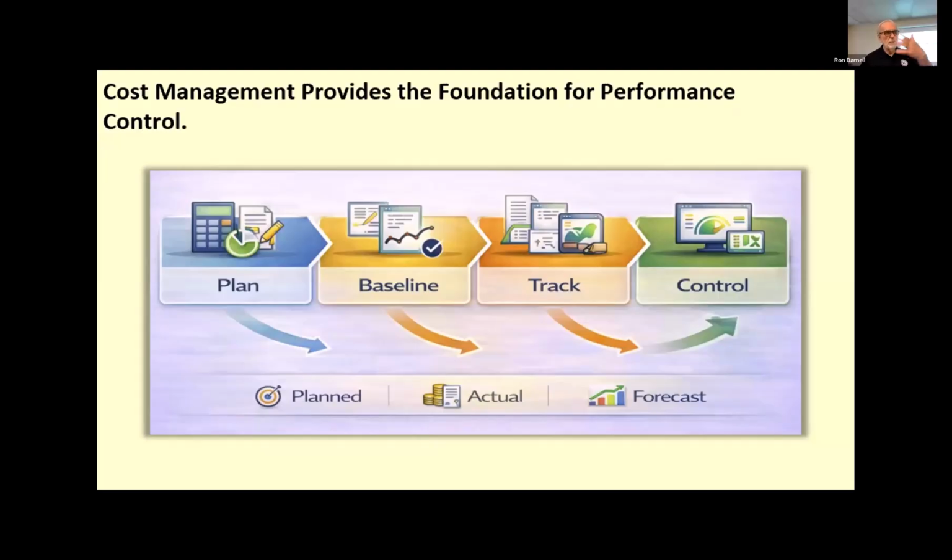In planning, we should have set all of the framework up for how we're going to accrue costs and time, all the rules of how we're going to manage, control, and monitor costs. Now what we're doing here is executing those or carrying those out. The key output of all that planning is our cost baseline, which is the reference point for measuring project performance.